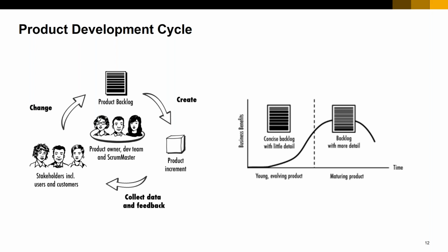Right now, a team of 10, for example, in our company also includes a data scientist and a DevOps person, right? These two colleagues have become a new addition in the last 6 months to 1 year. We have this concept of a team of 10. Each team of 10 is independent. They are able to deliver one product or a logical portion of the product, and they are self-sufficient with the product owner, the developers and the Scrum master. Now these two people are added also, right? So that's a typical setup.